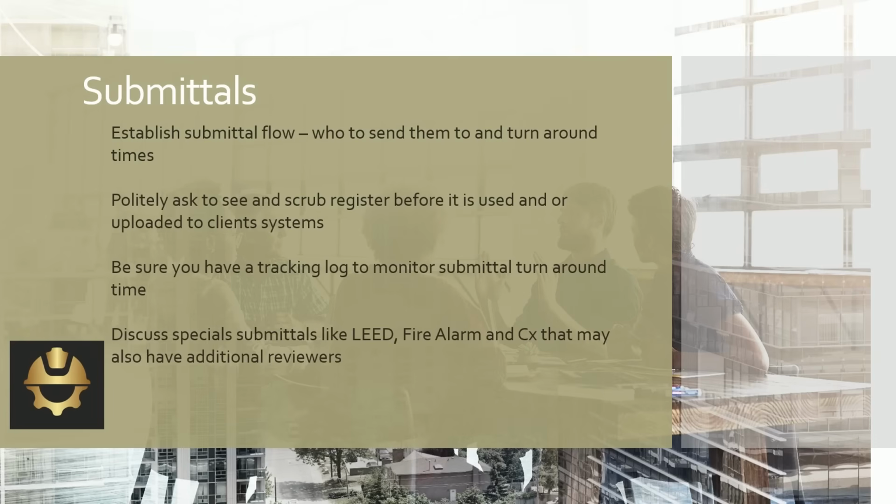I don't want you to come away with this thinking that we want to whittle all submittals away. We are big believers in the register and how important getting those submittals is. However, we've also seen 45, 50, 70-page registers. We ran those projects, and that many submittals is not necessary for anything. It just bogs everything down, and it makes your world so much harder. So if you can make that register as lean and mean as you can up front, it's going to save you a lot of headaches.